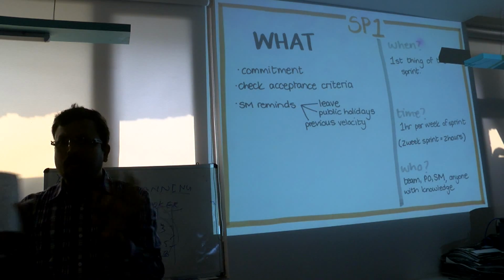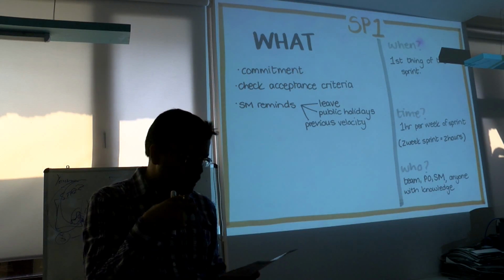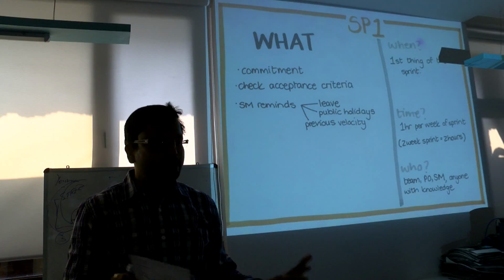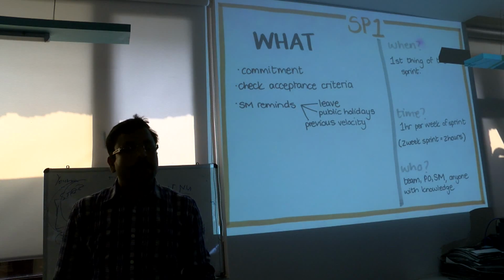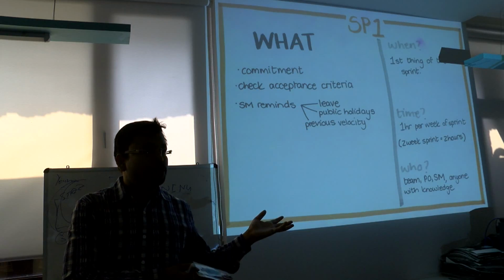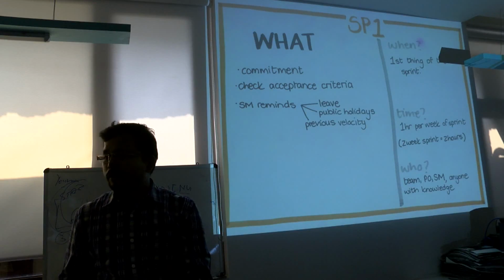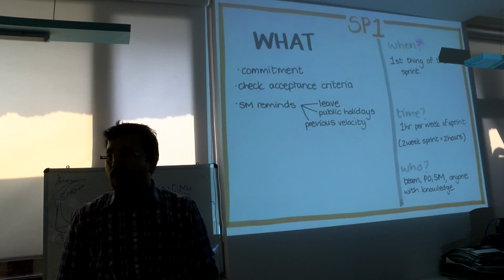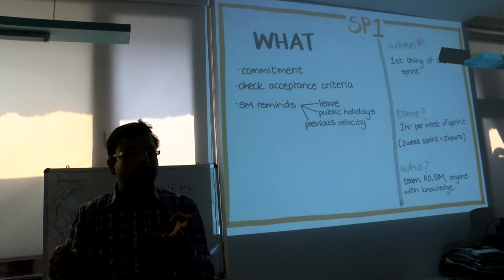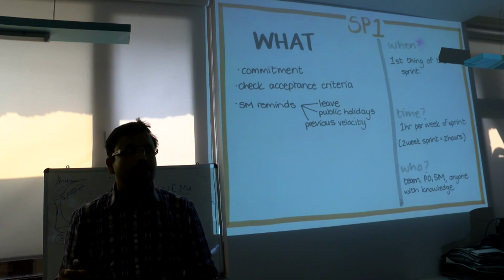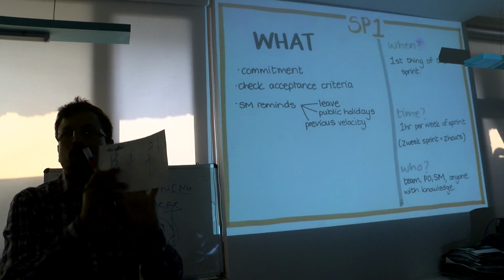So thinking of all these criteria, we will only pick the stories that can be fulfilled in this sprint. Like if in the previous sprint we finished 26 story points, the next sprint might have a 26 January holiday, or 2 people on leave, Sally and Ajit. So the overall sprint velocity might be less, and we will only pick 2 or 3 stories. And all the acceptance criteria would be there.